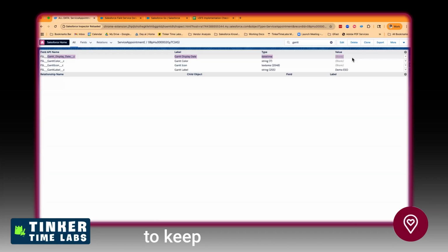Yeah, it's an easy way to keep them in focus so you're constantly looking at them on the Gantt, because what you're usually looking at is stuff that has an earliest start, due date, scheduled start, scheduled end, all that stuff that falls within what's on the Gantt. That's an extra date field they give you, and they don't really put a purpose on it. They're just like, make this be anything. If you want all of next year's work to show up as January 1st, set it to that. But if you want to keep dragging the old stuff into view, you can update all the records that haven't been touched to have, I guess, tomorrow. So when people come in and look at the Gantt, here are these on this list view. They haven't been touched yet. Let's get to them. The due dates are in the past. Let's do something about it.